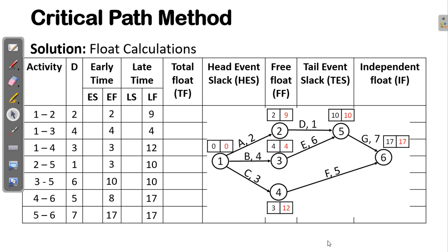Now, the other information, which is the early start time and the late start time, you can get from this table, or you can use the following formula. As I said, when we were filling this one, we said that this information here is the early finish time of activity A, but it is the early start time of activity D. So in order to avoid confusion, just take this information as the early finish time and the late finish time.